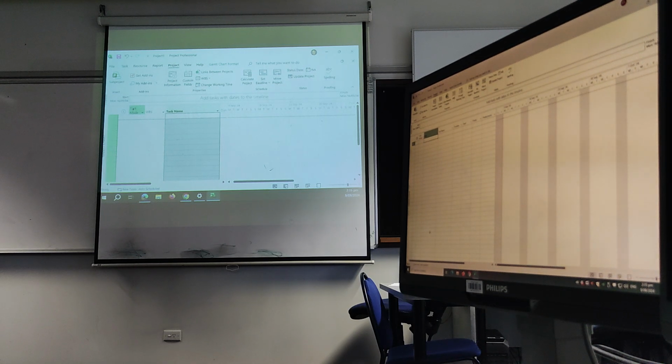And the way you develop the work breakdown structure is you take the whole project and you break it into big bits. Okay, so you remember when Stuart presented it, we had a road, and so we broke it down into a berm, the pavement, the driveways, just the big bits. Okay, and then we look at those big bits, we say, are they the size of a work package? No, they're not.